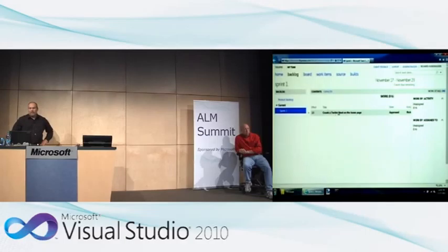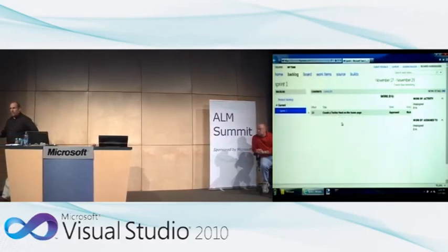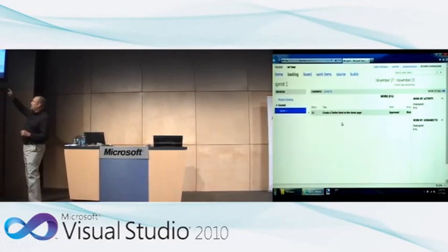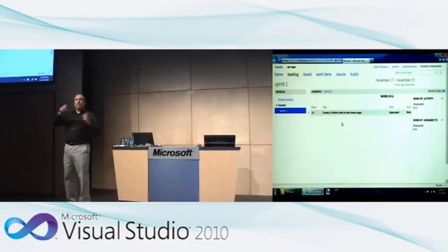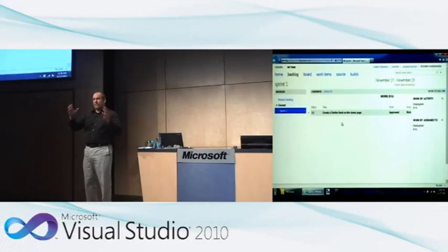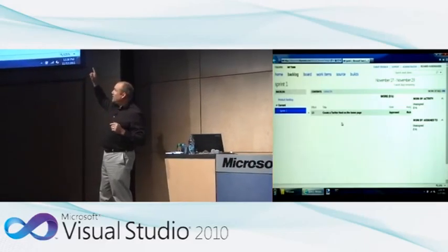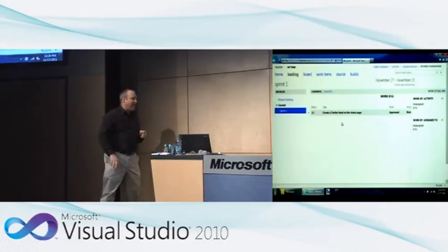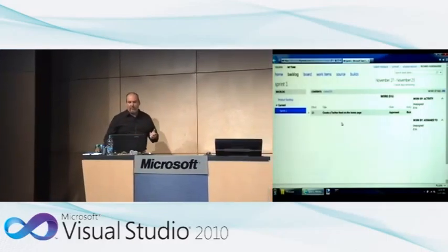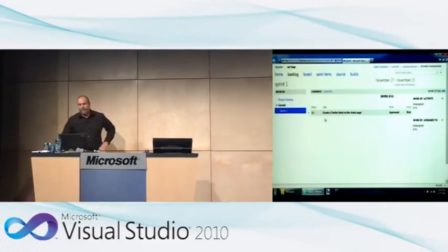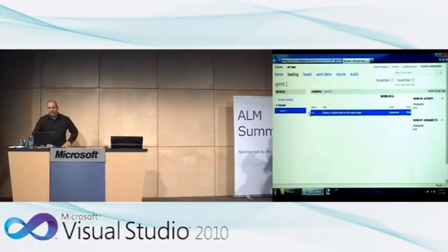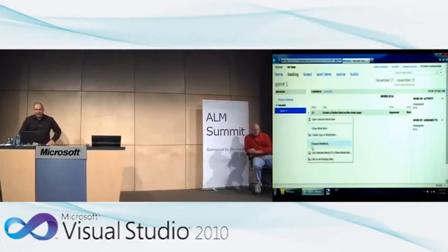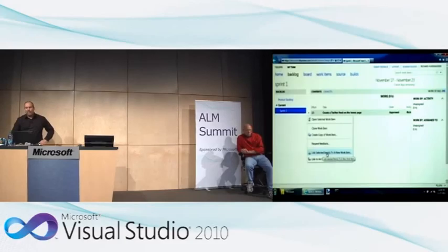Here it is in the sprint 1 backlog. And if we're talking about Scrum per the guide, what we're looking at here is the sprint backlog. Okay, it's the PBI or PBIs that we've pulled into the sprint 1 in this case. So this is actually the sprint backlog minus the plan. And the plan then is just us creating tasks that go along with this. So we can pull this up and pull that little down and say we want to link to a new work item and create a task that way.